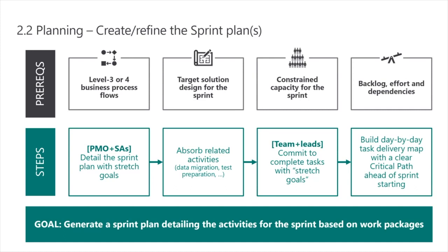In other words, in that sprint plan, you've got nothing there that says this is a 60-day effort, because the chances of you being able to estimate something that takes 60 days across 4 people is relatively low, right? You're not going to be that accurate. Whereas if you've got a sprint plan which says, this is going to take me 2 days, this is half a day, this is a quarter of a day, you're much more likely to be accurate. You're much more likely to identify the right dependencies. You're much more likely to complete the task on time.